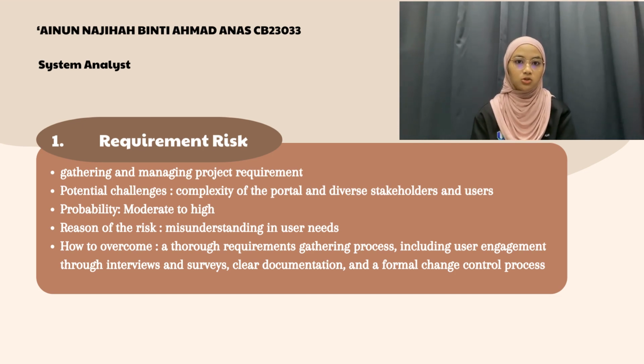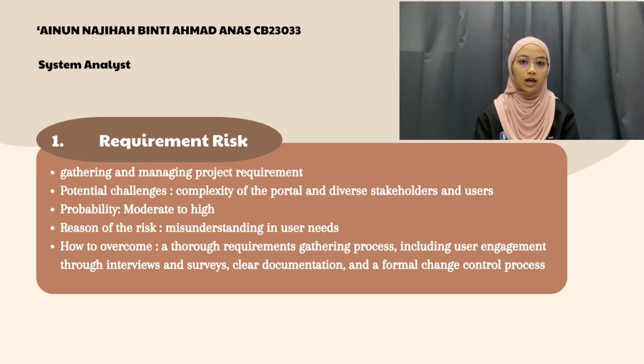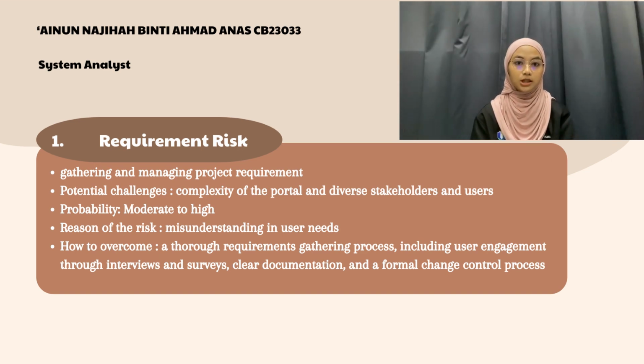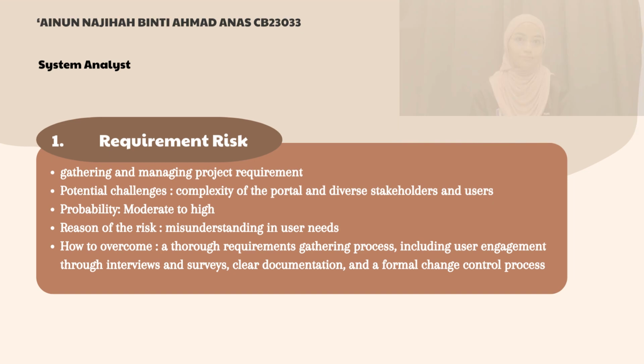Having a formal change control process is like having a plan. It helps us check how proposed changes might affect our schedule, budget, and also resources before we give the green light. This way, we can deal with potential risks and also challenges effectively.